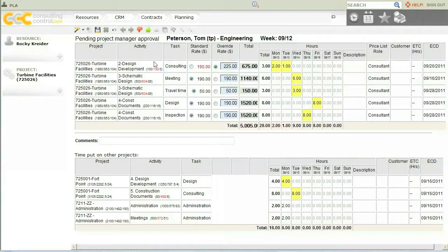We also see here three numbers, 100, 130, and 3. 100 hours represents the estimated hours for this activity from management. 130 represents the actual hours for this activity. It's red because it's being flagged so that we know we've gone over. And 3 represents the actual hours of this resource.